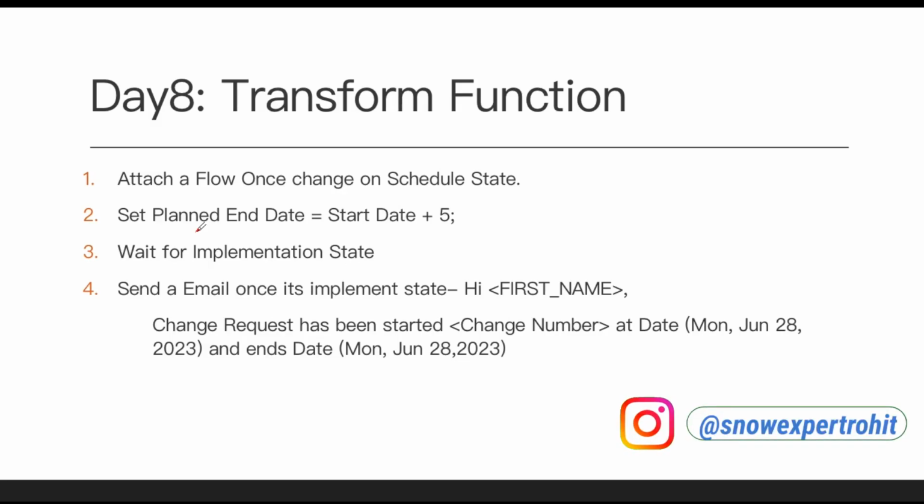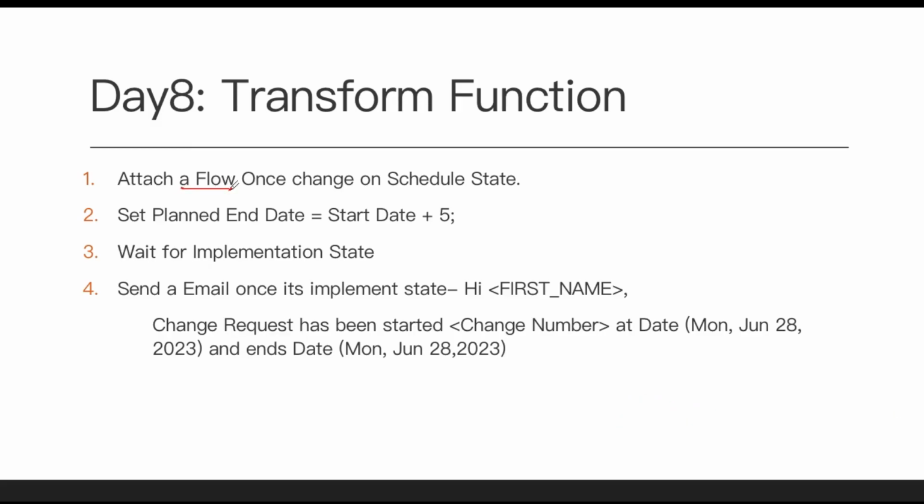In today's class, I'm going to create a flow. There will be a new flow, and that flow will be triggered the moment the change request is moved to the scheduled state. First I'm going to create a flow and attach it to our change request table the moment the change moves to the scheduled state. From our flow, we are going to set the planned end date, which is nothing but start date plus 5 days.